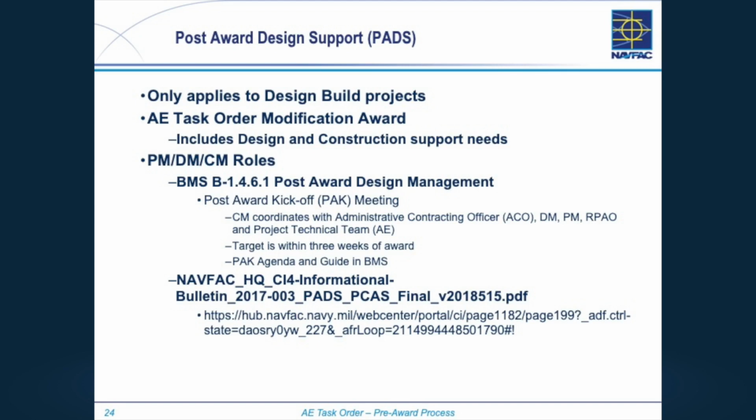But the thing to keep in mind is you are the COR for the AE contract, and you're still the COR for the AE PCAS effort. So that's your contract, and you're the one paying them for the PCAS services, inspecting invoices and overseeing that. But for the construction contract, the COR on that contract is your construction manager. If it's a design-build, that contractor is going to be sending that design information to your construction manager. They're going to be coordinating with you to get it over to you and for you to get it to the AE and do design reviews.